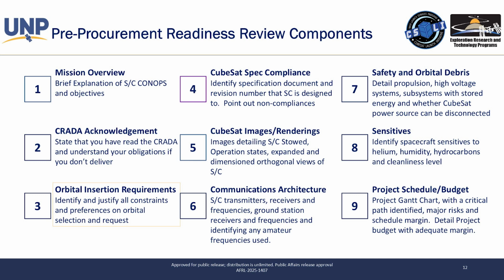We want to make sure that you have images of your spacecraft. Why? Because if you have images of your spacecraft, either a flat sat or CAD images, you're a little further along than most people. You'd be surprised how many times in the past people said they were ready for integration or ready for a launch service procurement and they didn't have a flat sat, or they were unable to show the stowed or operational state of their spacecraft, or even dimensional or orthogonal views of their spacecraft. So this is another check we do.